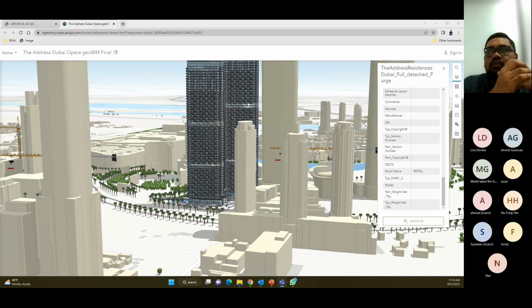That's why it's standard. Any project, they will push the BIM. Oh, this one you complete in 1 week, because we want to push everything on the second week. That's normal. So normally, what I mentioned earlier is that you need to approve your digital, approved and coordinated digital model 3 months or 1 month before the physical work starts. So that's the best way.